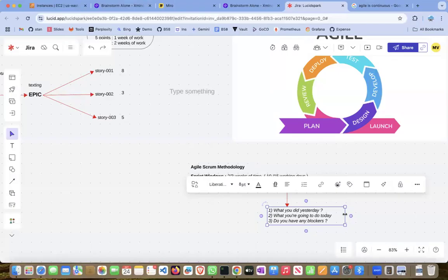A classic example of a blocker is when I'm working on something where I don't have a solution at this point because I'm still figuring it out. Or my analysis says the feature cannot be done unless an engineer from another team helps. I've reached an endpoint, but for my feature to work and be tested, I have a dependency on the other team. Then I'm blocked. Another example: I'm a developer developing a feature that has to be validated and signed off by the QA engineer, but the QA engineer says he's busy or is not responding. You can consider that a blocker and mention it.